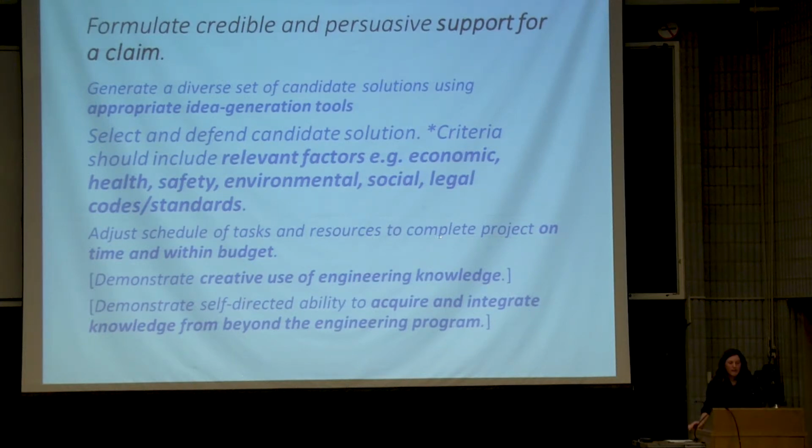You need to provide support for your claim that you're going to finish this project on time and in budget. So that means allowing reasonable timelines for the different tasks. That might take some research. You might need to look up how long it takes to construct some sort of device. You might need to look up how long it takes to run some sort of simulation, however many times you need to run it. And then you'll need to do a more thorough budget financial analysis than you might have done so far.